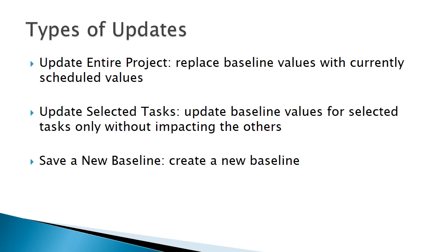As time passes, we may need to make some changes to the plan that we baselined. We might have to take actions such as add tasks and assignments, delete tasks and assignments, or make other modifications. In general, a new baseline should only be created when you replan the project, or you encounter a large number of deviations from the plan. Therefore, it should be rare that you are replacing baseline values. More than likely, you want to save an entirely new baseline or just update the task or tasks that were added. In this case, we just added one task.